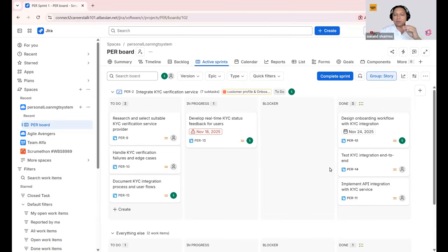If every team has its own Scrum or Kanban board, a Scrum Master, delivery manager, or project manager has to switch between three different boards just to understand the overall progress. Now, in place of that, you can create one board, Scrum or Kanban, that displays issues from all three Jira projects. And this gives you a single view of the entire delivery process. That's the very first advantage.